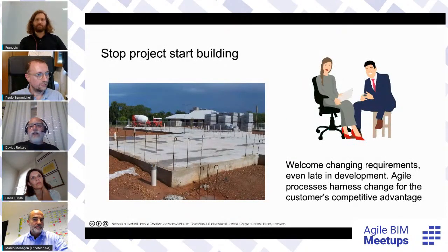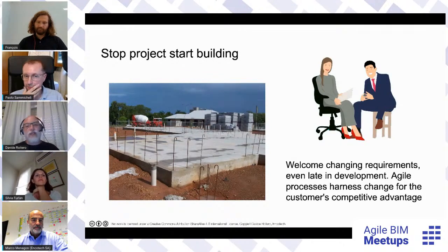Stop project, start building was another challenge. It is true that we accept changes even at an advanced stage of development, but changing a wall is not the same as replacing a single line of code in a software program. It's a little bit more difficult. However, we also realize that the customer understands what they really want as they see the first things realized. The teams have therefore decided to spend less time at the beginning on a very detailed design and then decide with the customers what can be decided later.